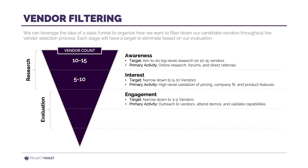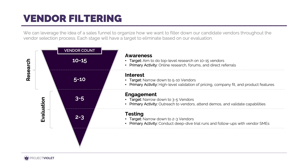From there, engage their sales teams, conduct the demos, and hopefully narrow down to 2 to 3 vendors where you can do some extensive testing in their trial run systems and then make your selection and purchase. These counts are just suggestions — you can always add or remove more based on how the process is going.